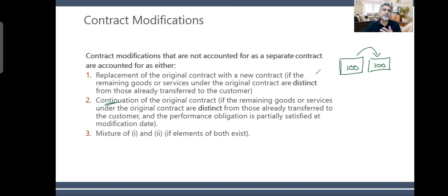We will save time, you will save time. I said, you know what, here I need $10 more because I cannot afford to do it for 100 anymore. I was doing it for 100, fine, but from next year I want to take $10 more. And you know what the client says? I have seen it many times. They say, you sign the contract with 100. After 1, 2 or 3 months, I will give you a variation order. And in that variation order, whatever services you perform, I will add something more and give you the benefit in the variation order.